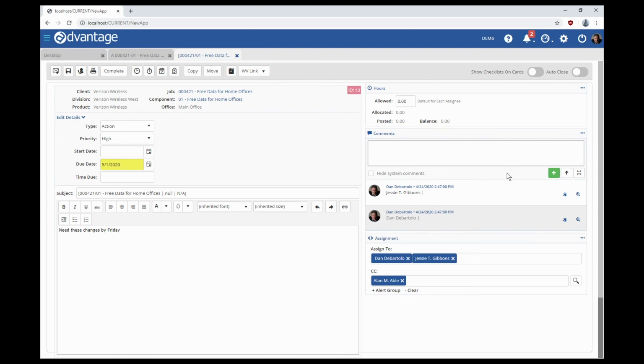When we say to you, that's log ID 421-13, what we're telling you is it references the job number, 421, and ID number 13. So we tag everything back to the job jacket and the specific ID of the assignment. So that one centralized location again is vital for us to keep track of things, and you can do that too.